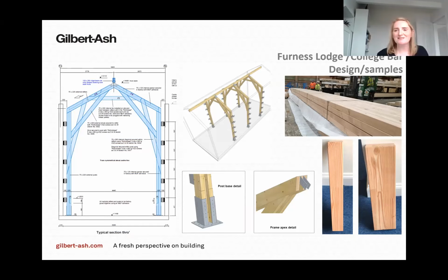No problem. Okay, so the next little bit to touch on is the glulam frame that sits within the college bar. There were some images of this in earlier presentations. The subcontractor we appointed for this piece of work is called Constructional Timber, and they were brought to the table again quite early on in the project. Two reasons for this, one being programme. This was an early piece of works, but also timber shortages, especially Douglas fir. So it's really important that we secured the order for this quite early on.